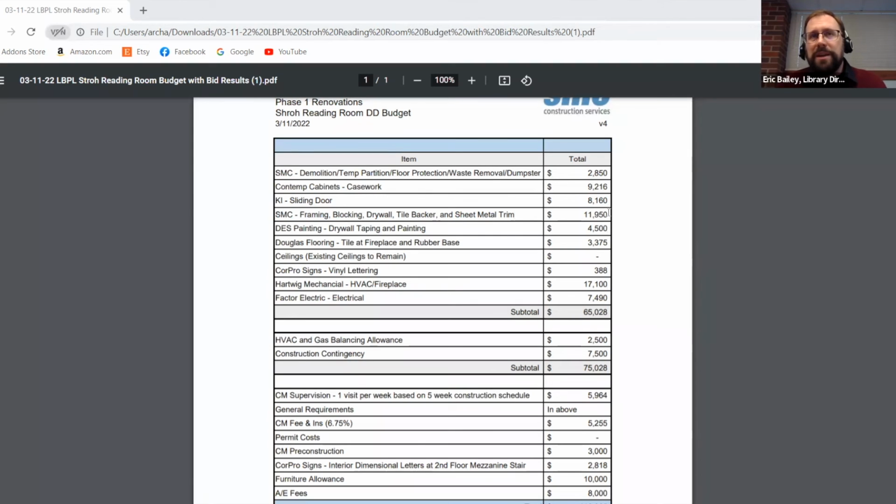For any expenses that we approve, having the contract signed and on file to attach to the vote that we made keeps our auditors happy when we talk to them at the end of the year, which keeps me happy. Happy auditors mean happy Eric.